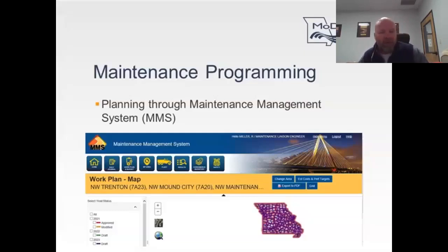Well, our targets are typically pretty close to the same every year, so you can go ahead and work on the projects you're going to do an annual update on for the next year. You can start out those throughout the year and then submit that information early. Some districts actually have that scheduled so that they update their existing projects that are in the STIP in October, and then they work on their other projects after October. So any new projects they want to add are started after October, and they work on those through March whenever the STIP is submitted. So some ideas for you all to kind of spread the workload out throughout the year.